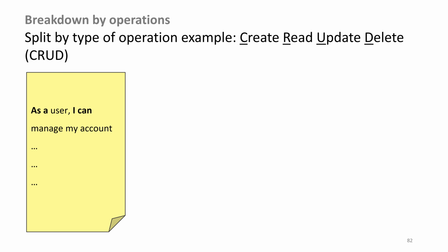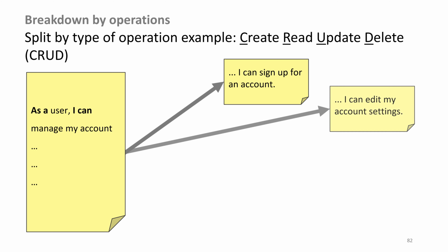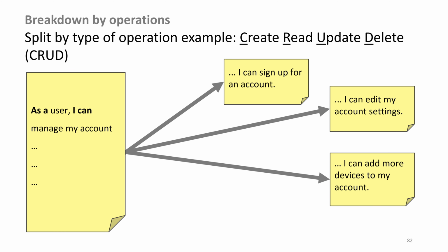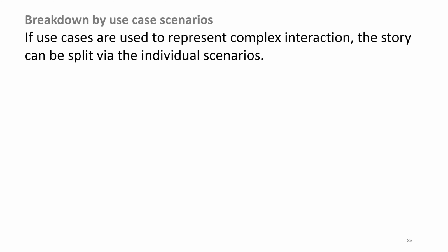As a user, I can manage my account. I can sign up for an account. I can edit my account settings. I can add more devices to my account. I can cancel my account. Breakdown by use case scenarios. If use cases are used to represent complex interaction, the story can be split via the individual scenarios.